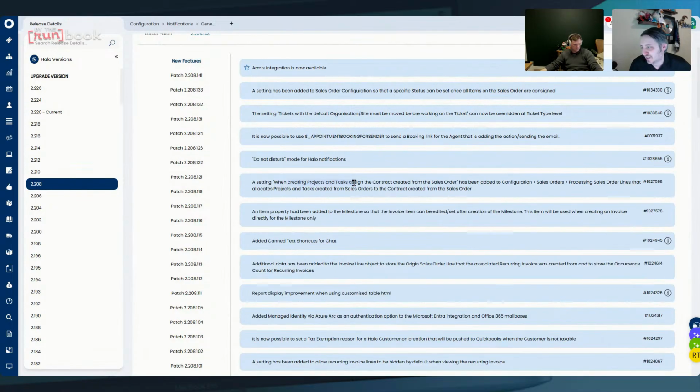Setting when creating project tasks assigned a contract created from sales order has been added. Configuration, sales order processing, sales order lines, that allocates the project task created from sales order to a contract created from the sales order. Oh, interesting. Yeah, this is awesome. We always tell people that technically speaking, if you're building a project, you're assigning a statement of work, that's a contract. You should have a contract created for that project. Yep. So now it's linking it through, right?